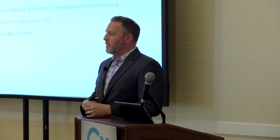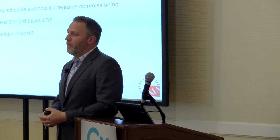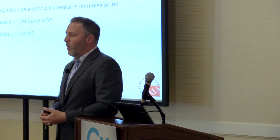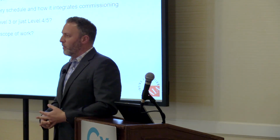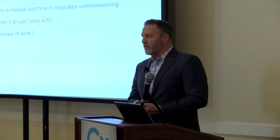Have a large, fast-reacting team. Not a lot of commissioning authorities I know have the luxury of having 20 people on standby waiting just to go to a data center and commission it. So if you have to team up with a partner, a local partner, use that as a great resource. Somebody that can provide on-site presence, somebody that has 4 or 5 qualified mechanical commissioning authorities and a couple electrical commissioning authorities to support you. Don't take on more scope than you're comfortable doing because there's too much at risk.